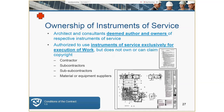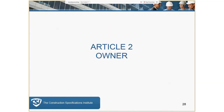Ownership of instruments: the architect owns the documents unless it's spelled out differently within the contract. This is unique to the AIA documents. Most other documents — especially owner-written ones — the owners claim ownership. If you get supplemental conditions or an owner using a different form, it's a good idea to compare it to the A-201 so you know the differences as you're performing the work.